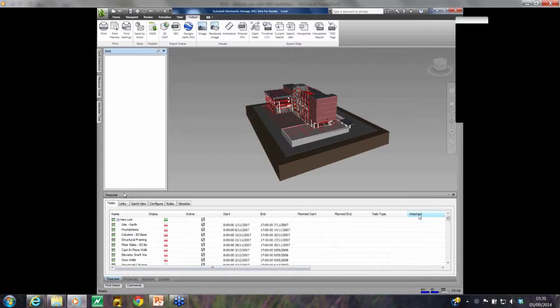We can then assign a graphic, a visual appearance, to the status of those elements based upon whether or not they're on schedule, before or after a required schedule date, and whether, in the sequence, the visualization that we're about to produce, something needs to be created or demolished, and an appropriate color assigned.